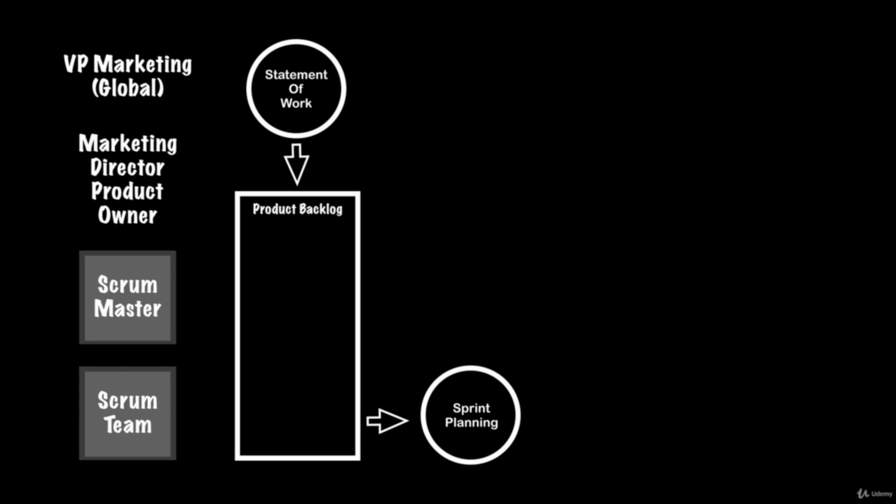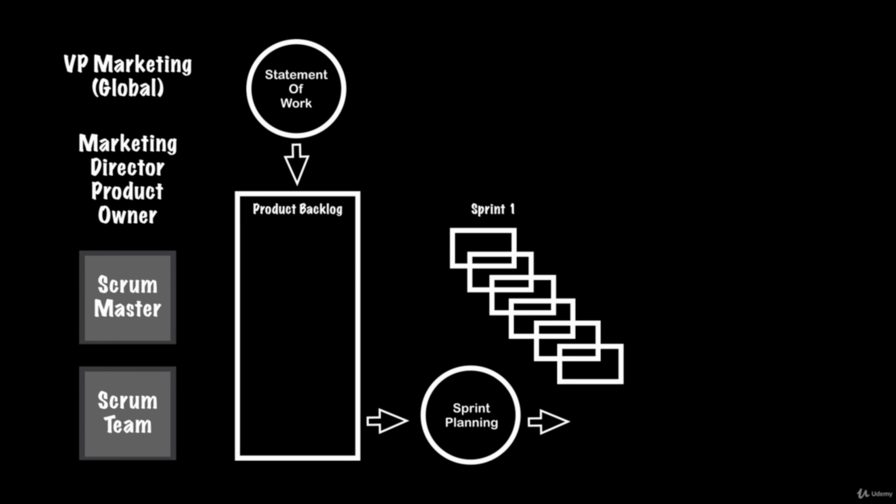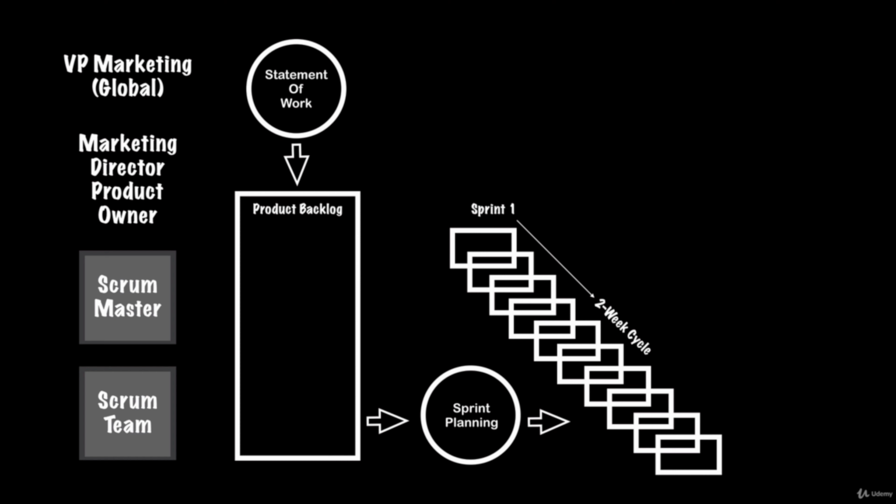So for the UX person, he knew clearly what needed to be done for the whole project, so he broke it down into bits. We had a total of 16 sprints, if I remember correctly. Yeah, about 16 sprints. So it was 2-week cycles, and at the start of each iteration we created a list of items that we needed to finish at the end of each 2 weeks, and presented, and we had a meeting. So the meetings were the daily meeting, the planning meeting, and then the show and tell.